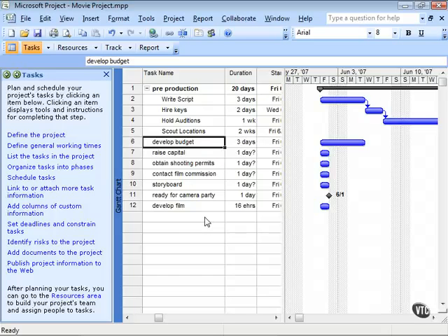So as we wrap things up here, we've created some finish to start relationships, which again is going to be the default. We've defined other types of relationships. By the way, the start to finish relationship, the one I mentioned, is not going to be used that often. It would be used in a case where something becomes available and that availability defines when the other one ends. Maybe you have just a planning phase and it's going to end when the work actually starts. That's the only time you'd use maybe a start to finish relationship, but again, to define a hard relationship between two tasks like that, once again, it's going to be rare.